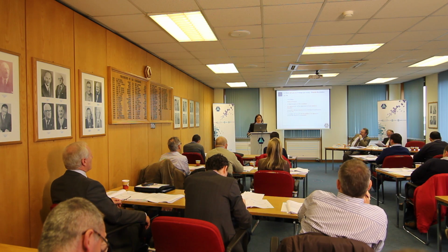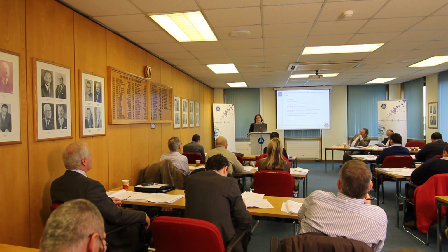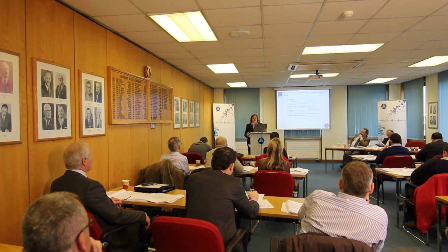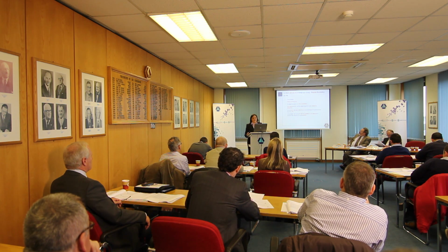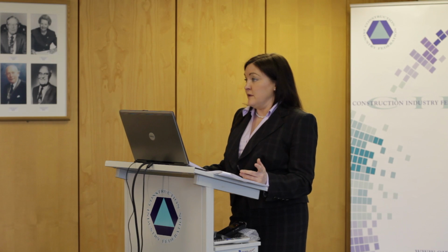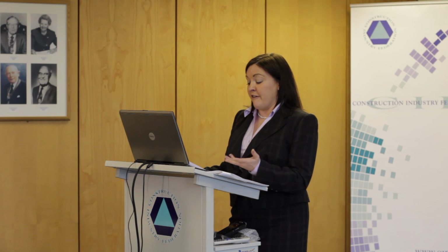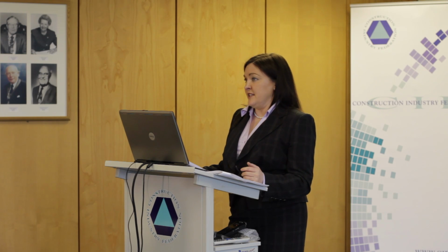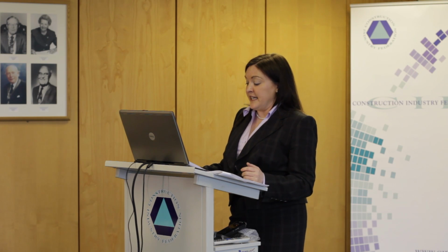Because again, he'll be able to take into account, the contract actually provides that he can take into account when you requested it. So that's kind of a peculiar sentence which I've never quite worked out what it means, because the implications of it are what? So he was entitled not to give it to you? Again, slightly ambiguous, but the way to overcome it is if you simply ask for your instruction when you need it. And obviously it's in order to avoid delay. Again, specify the price adjustment and the time extension you need if required.